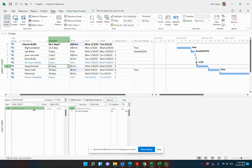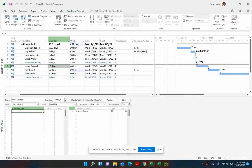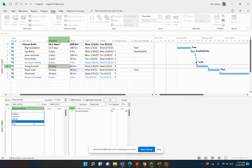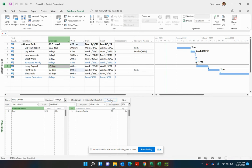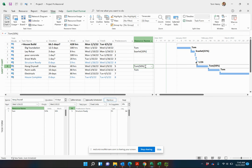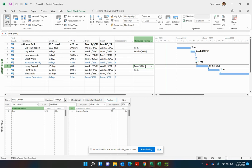Do the same thing for hang drywall. Put Tom on there as well. You can see Tom's working 50%. We supplied two variables. Microsoft project calculates the third. By estimating the duration and the work, Microsoft project is always going to calculate the units for us. So if we do increase the duration.